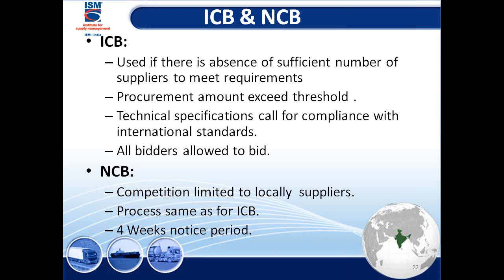In the case of Government of India, it's spelled out in the general framework, so it's already there. If the threshold is more than that, you have to go with ICB. Technical specs call for compliance with international standards. All bidders are allowed to bid. When we come to NCB, competition is limited to local suppliers, and the process is the same as ICB.